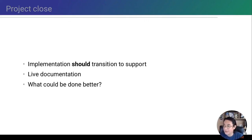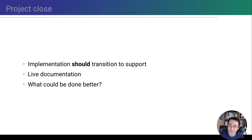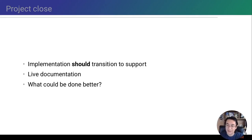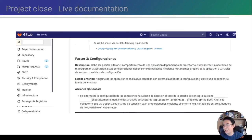What's the final phase in this kind of project? Implementation should — and I emphasize this strongly — implementation should transition to support. You have to consider that once this migration is finished, or at least starting to take off, you have to be prepared to pay for support: being an internal site reliability engineer, or contracting third-party support for your infrastructure. You have to maintain live documentation, and this live documentation has to transition to support as well, because once the migration is complete, you have to update the documentation with meaningful changes and register what could be done better. I did this over a wiki. This kind of migration project, as any other IT project, will be considered successful if the project continues living — when you say an application is legacy, it's another way of saying it was successful enough to be alive all these years.